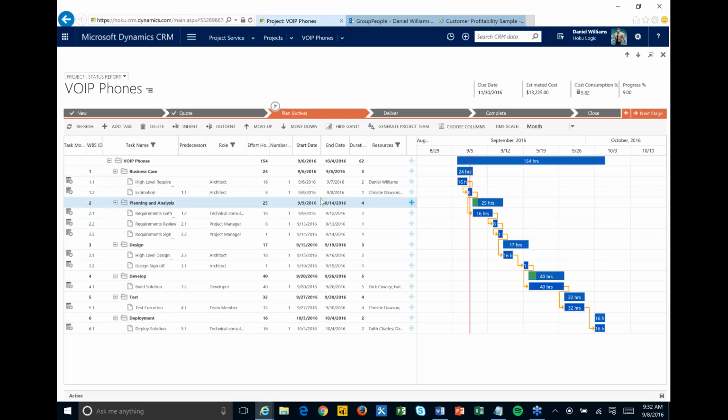We can then come in and update start dates and end dates and play around with this a little bit and move the start date around for the project, those types of things. From there, we're ready to go. We're ready for either the project manager to go find a resource themselves, or if you have more of a resource manager type of role within your organization, that person can then utilize the system to find the right resource and basically replace these generics with actual named people.